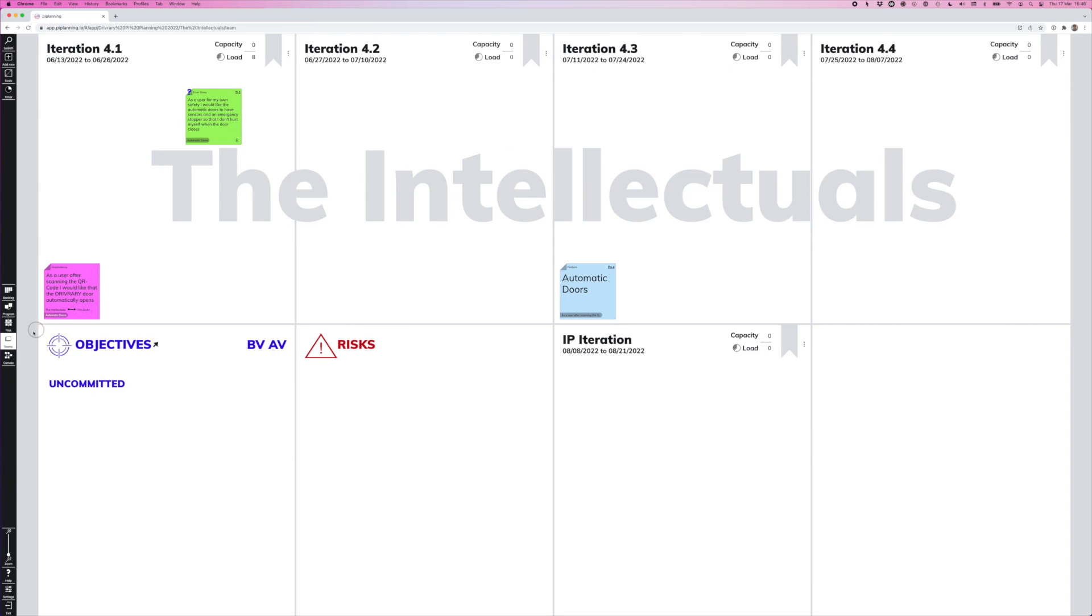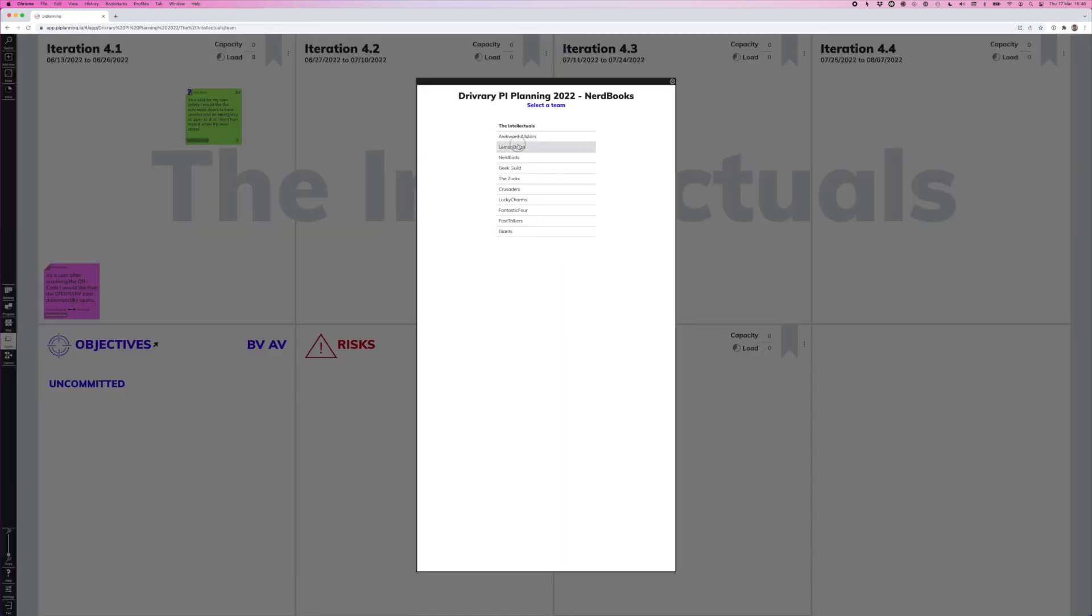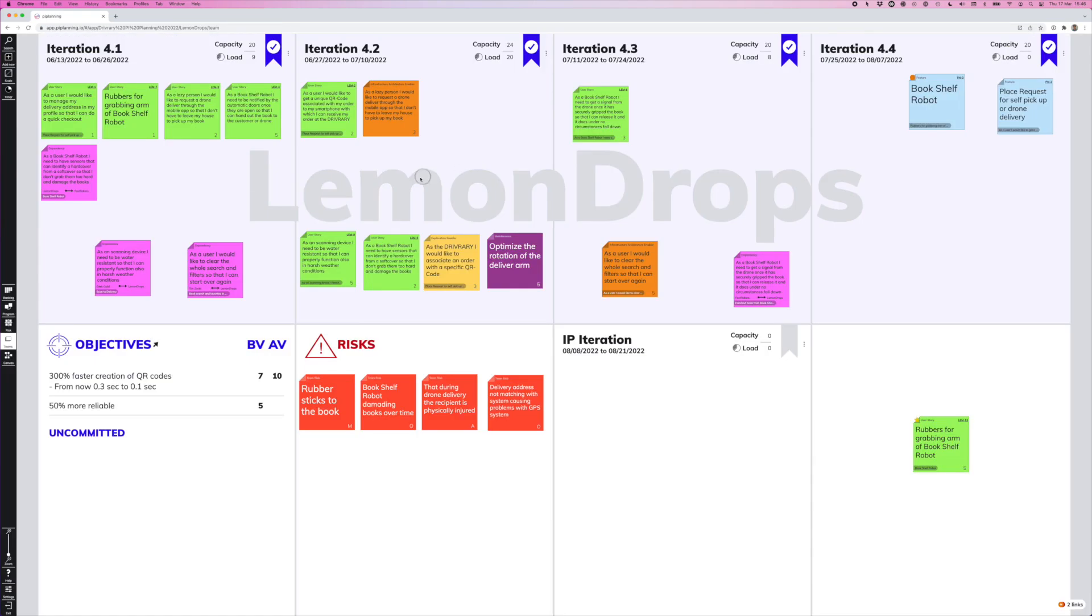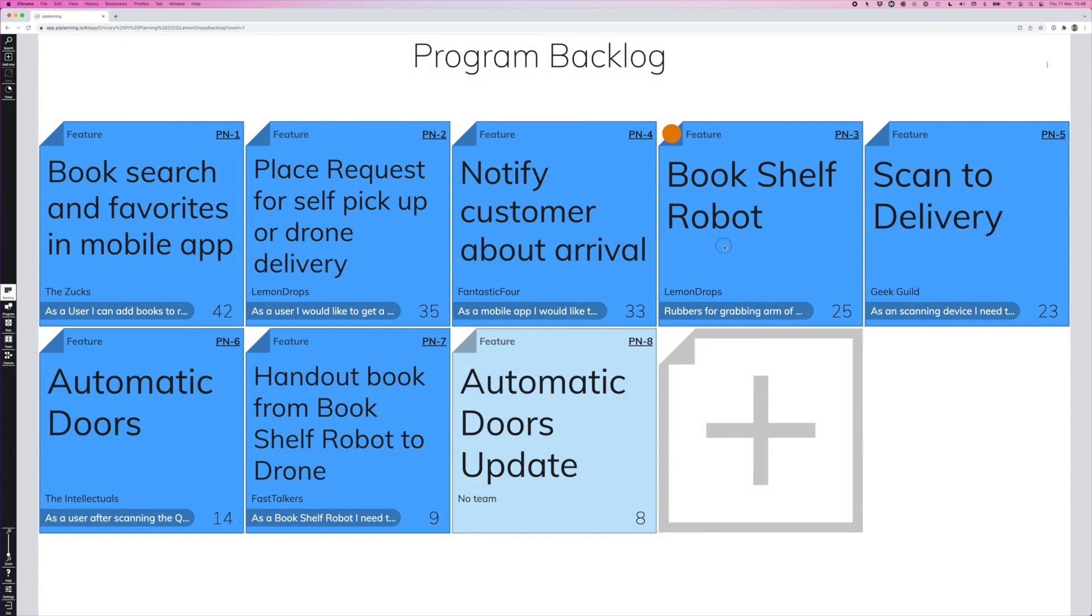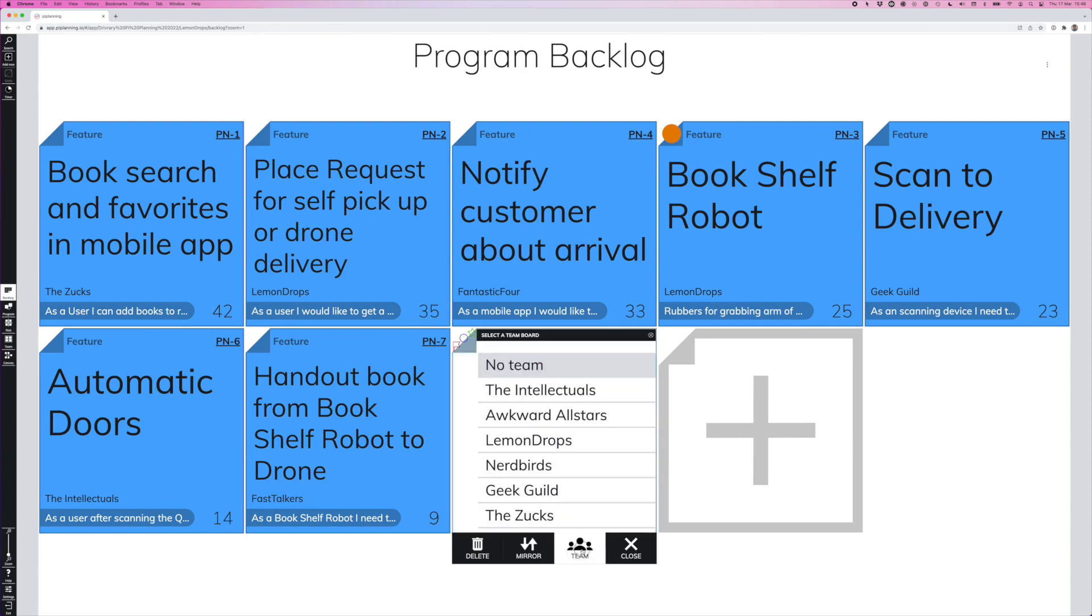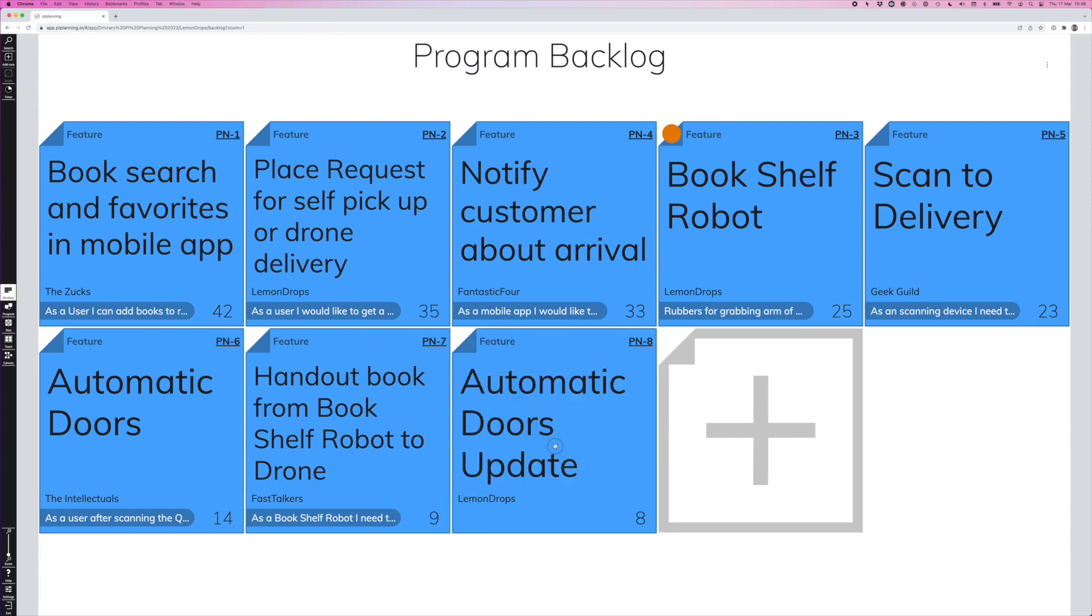Now let me switch back to our team board. Typically, we start from the program backlog board, where we manage the top 10 features ranked by the WSJF value. That's this number down here. From this board, we can assign a feature to our team. We can do that by clicking on the feature, clicking on team, and assign it to our team. Now, as you can see, it instantly changed its color. That's something that you can configure in the RTE cockpit. And this is very helpful because it lets you keep an overview which features are in planning already and which aren't, which is especially helpful if you have small batch sizes and maybe 20, 40, or even over a hundred features on this board.